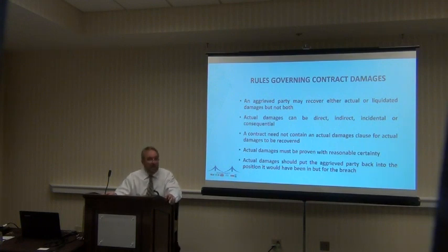No. If you were building one of the new NFL football stadiums and you had a liquidated damages clause for failure to complete the project by a required date, and the amount set forth in the clause was $100,000 per day for each and every day, that's your exclusive remedy for the late completion, not for the furnace that burns up in the men's room too. And just to say it on the flip side, you couldn't get the $100,000 per day and actual damages as well.